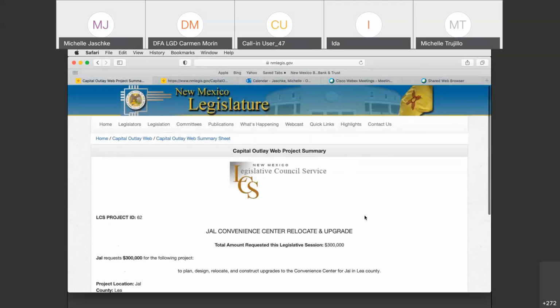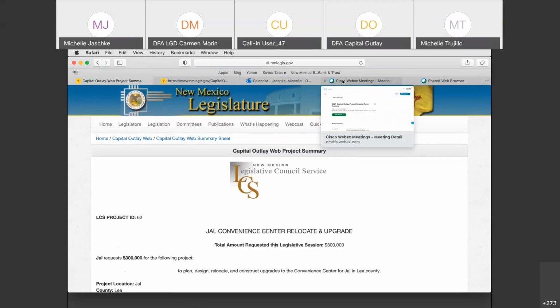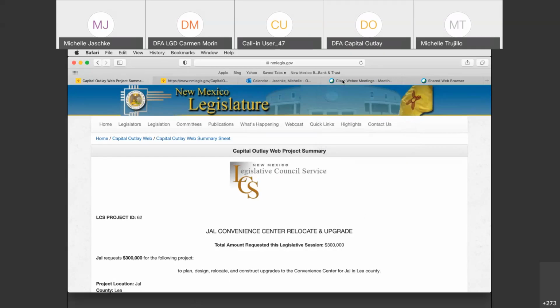Yeah, I can answer. Hi, Michelle and Carmen. I did answer it a little bit in chat. So, if it's funded with the general fund, and there is a risk of the state budget having issues, we could potentially claw back some of that, as we did during the special session back in June. If there was no activity on a project, we put it in that bill, Senate Bill 5, to take that back. But usually, especially with severance tax bonds, if you've encumbered 5%, and sometimes if you've just encumbered anything, we will look past that and not take any money back.